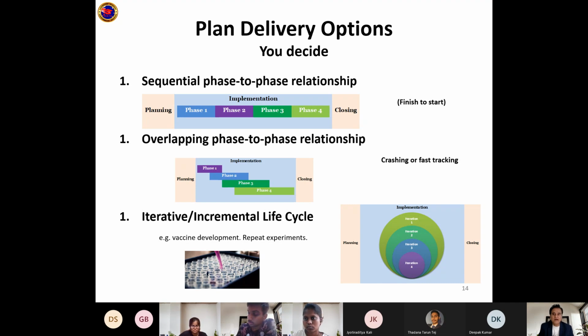Okay, so that is the planning that you will do. Now you can only do it if it is possible to do multitasking. Not every time all the tasks can be carried out parallelly. You can't do all the things parallelly. Okay, so wherever possible, you will do simultaneous overlapping parallel tasking. But when it is not possible, you do sequential planning.